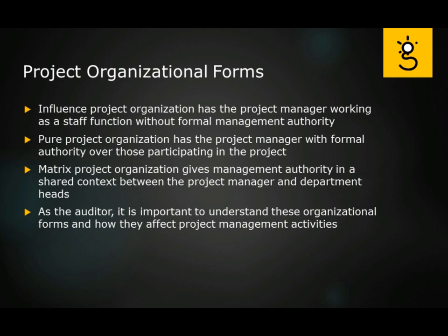In the pure project organization, the project manager has the formal authority over the participation of the project, right? Everybody, I should say, that is participating in the project. A matrix project organization gives management authority in kind of a shared context between the project manager and the different project heads. Now, as an auditor, it's important for you to understand how these organizational forms work and how they can affect the project management activities.